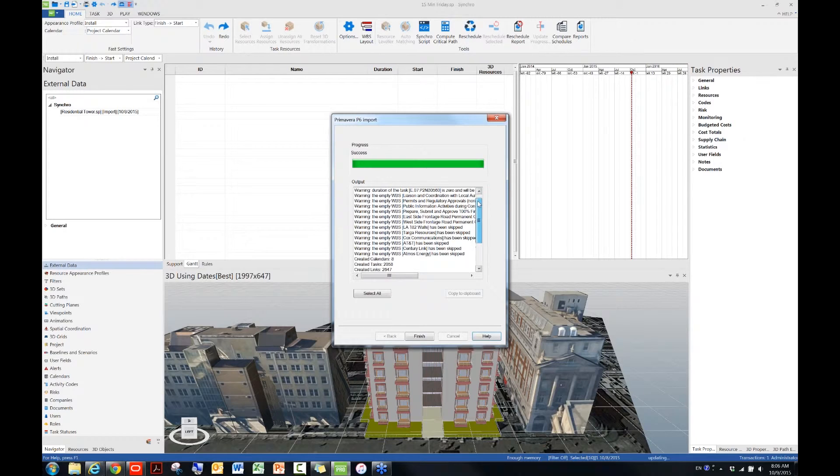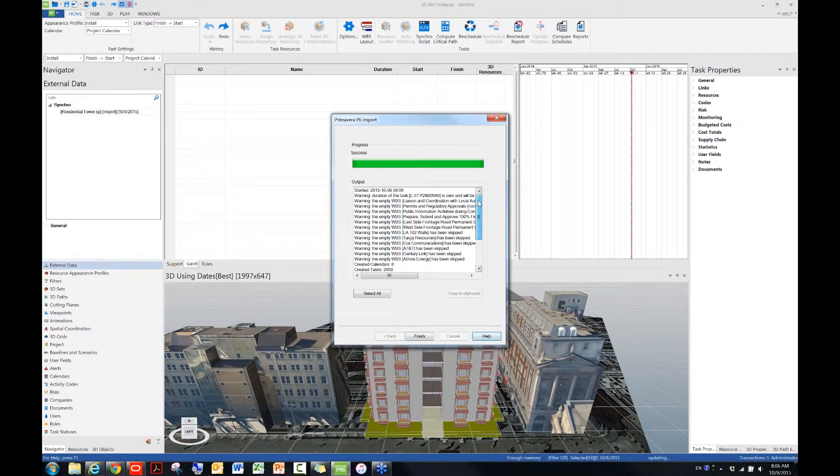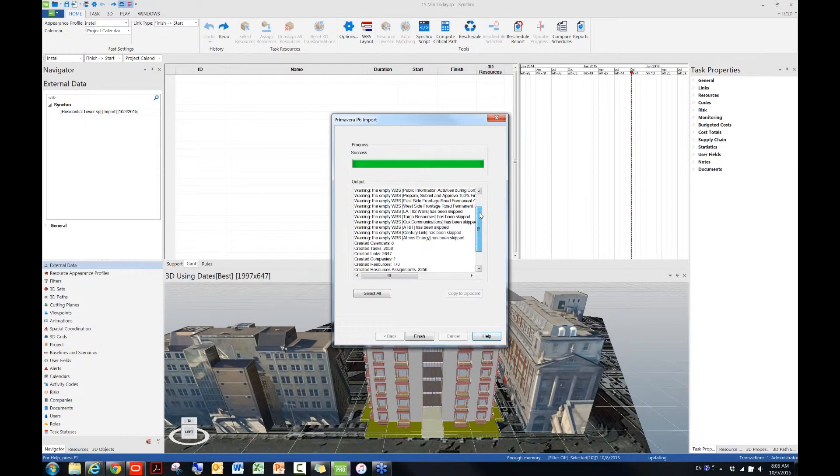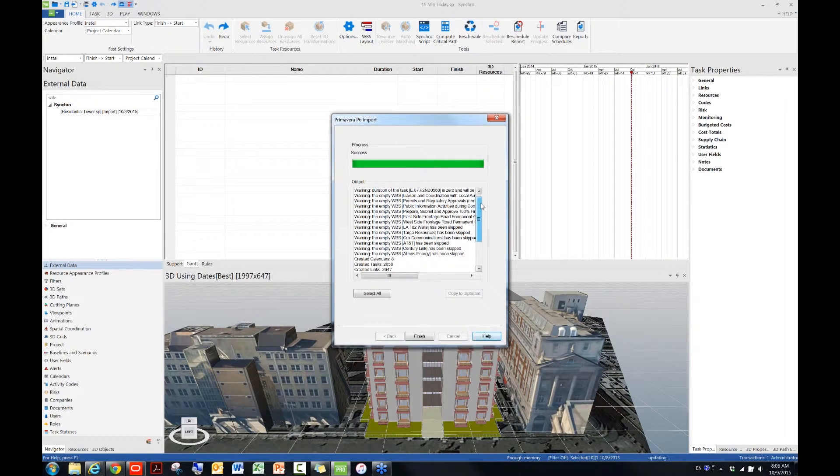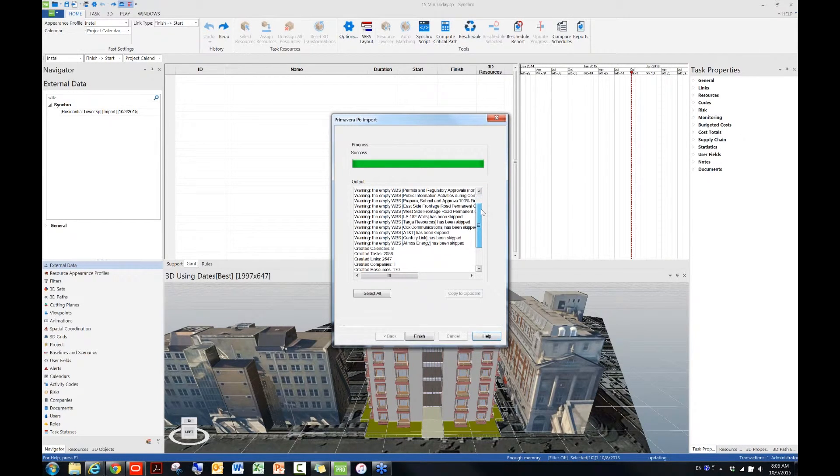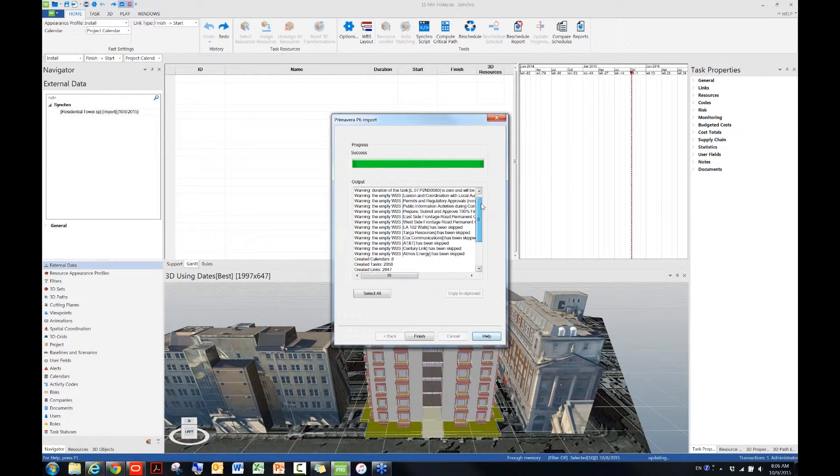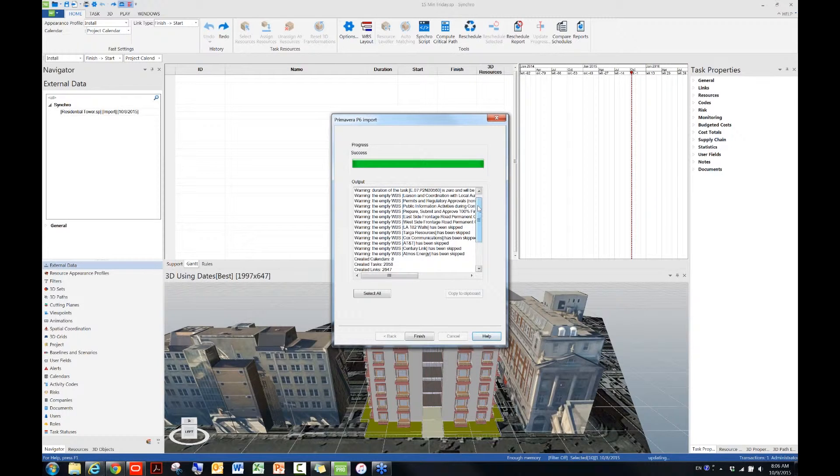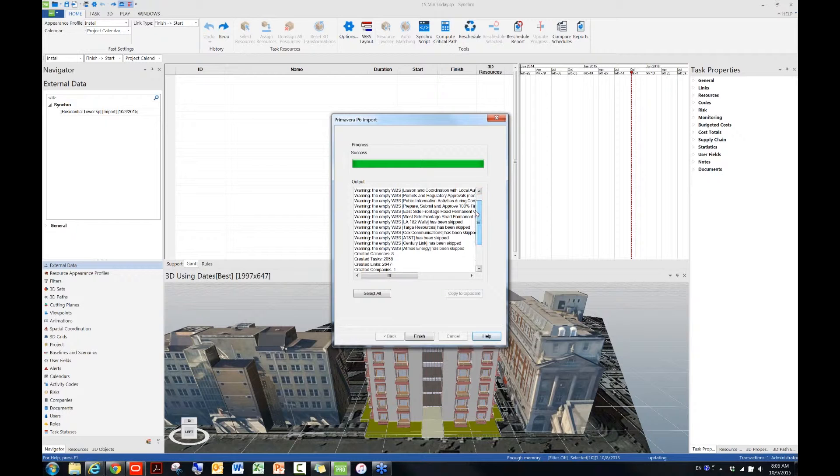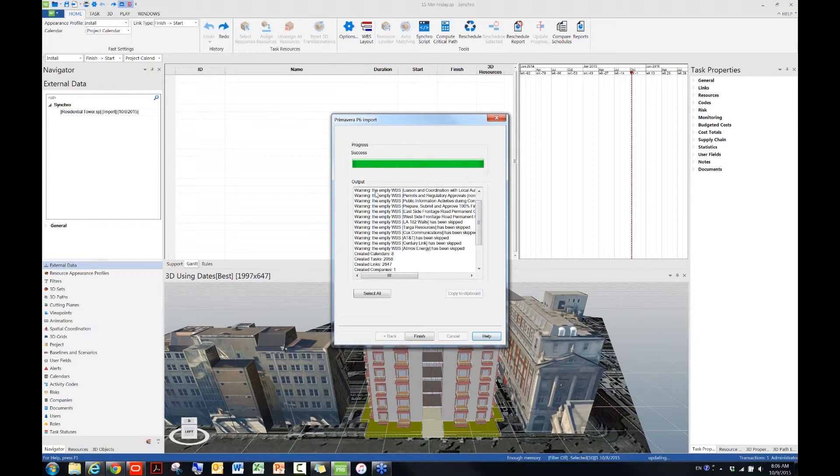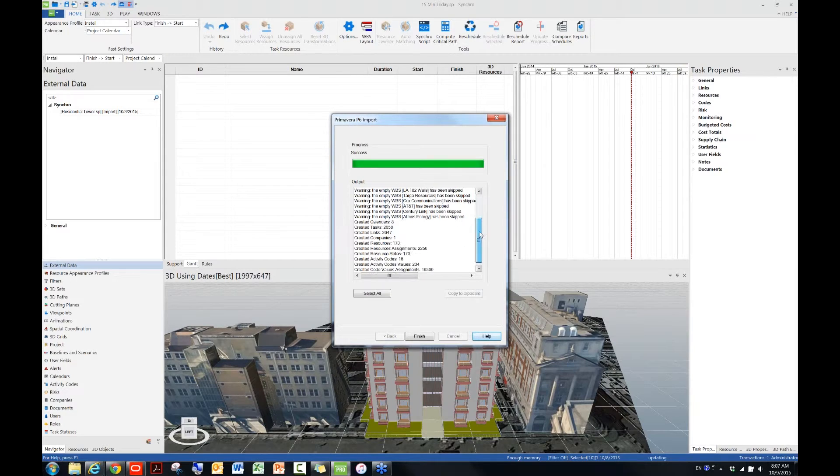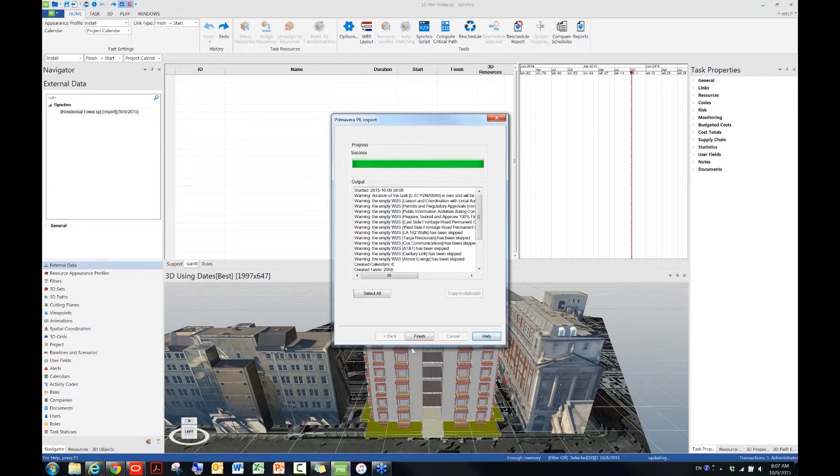So now you can see the import is successful, and then 99% of the warning messages here about the MTWBS. Basically, if you're familiar with both P6 and Synchro, you will know they are slightly different from each other. So in this case it doesn't really matter, because the MTWBS doesn't contain anything, so they don't get to be imported into Synchro. So I'm just going to hit Finish to finish the import process.